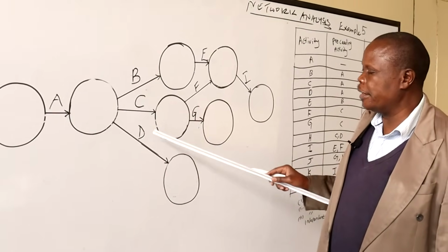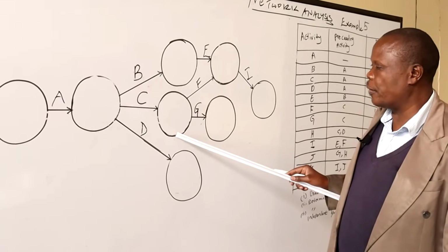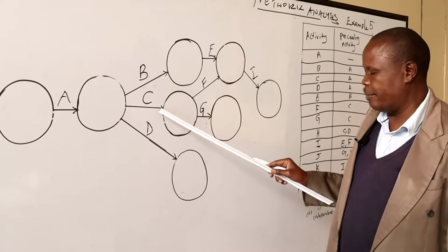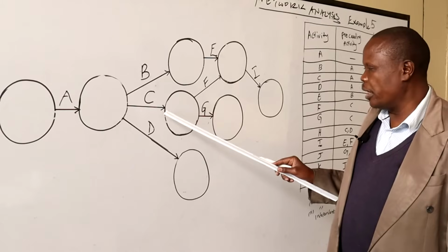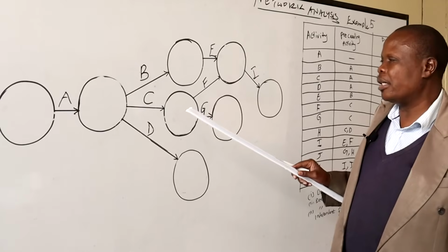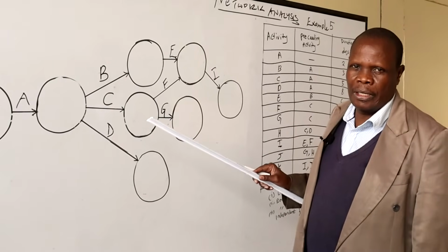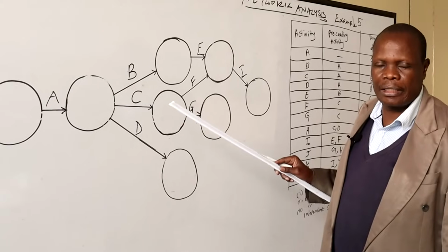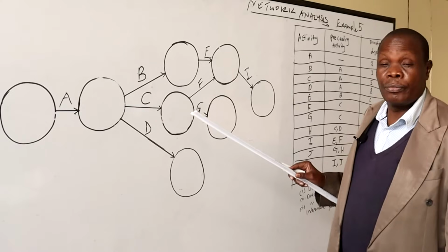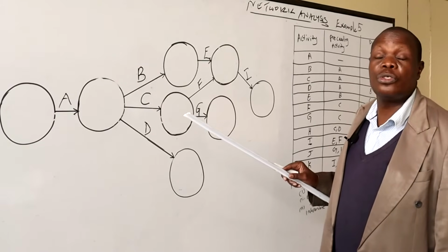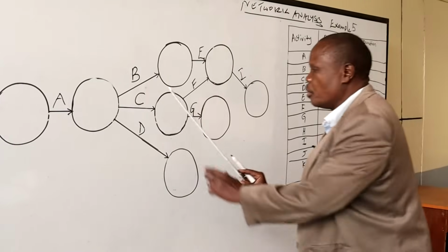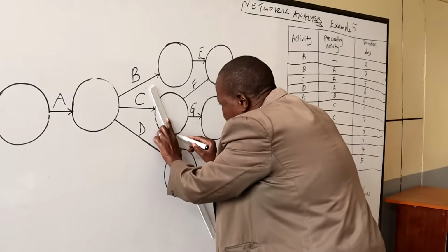So C and D, again, we are told that they converge, and those activities which occur at the same time will only converge when you indicate in a network by using dotted arrows. These activities are known as dummy activities. They occur at the same time or simultaneously. They do not consume time or resources. So their duration will be 0. So draw it here.